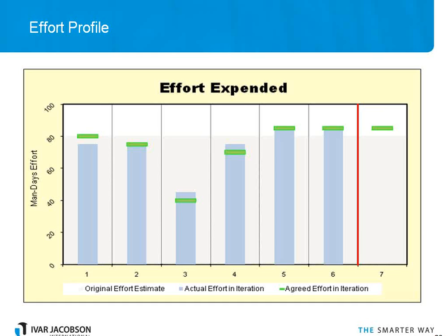So we started to be a bit conservative in 3 and 4, and then 5 and 6 came in on the button again, right on the nail. You can see now, although there's no actuals for iteration number 7, because we've finished iteration 6, we've estimated how much effort we're going to do. Okay, and again, when we look at our progress, our objectives, our velocity, we can look at what we need to have in place for the next iterative time box. So that can be very powerful.